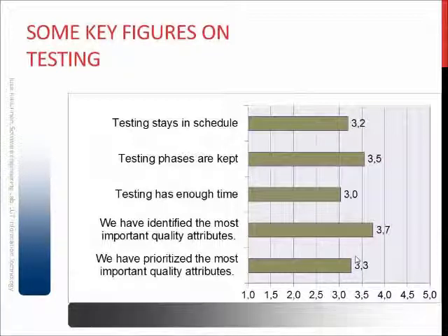We may have release conditions something like no serious or critical level errors anymore. The product functions and main functionalities are working. There's less than 5% of the money or time left, these sorts of things. So overall, we always launch stuff with errors in them. So it's also understandable that the companies may say that they don't have enough time for testing because there's still something missing.